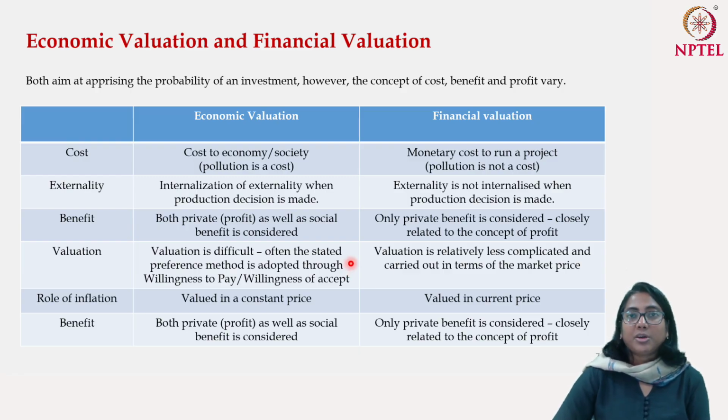However, things become really challenging when we start talking about the economic valuation. When we are talking about generation of employment, or when we are talking about reduction of pollution in the local vicinity, it does not have any market value. The pollution which has been reduced, the bad which has been curtailed, doesn't have any market, so it doesn't provoke any kind of market price. So if you don't have any understanding of the price, how do you value something? How do you say what is the value of the emission mitigated, or what is the value of the pollution that has been reduced? In that case, sometimes we take a different approach, which is called a stated preference approach.